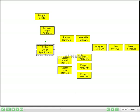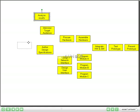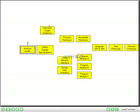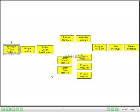Before we could author the design specifications, we had to have analyzed the results. And before we could analyze the results, we will have had to have interviewed the target audience. Now as you can see, we have what shapes up to be a network diagram, and we can test this network diagram by moving from the beginning of the project to the end and confirming that we have things in the right order.